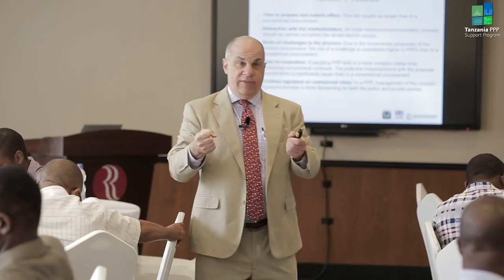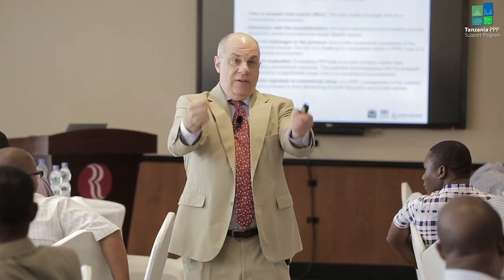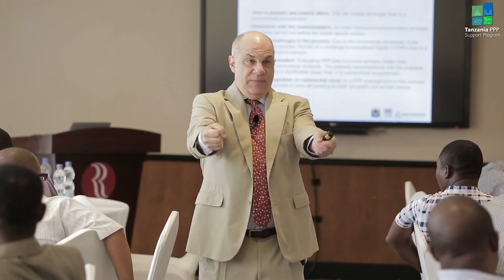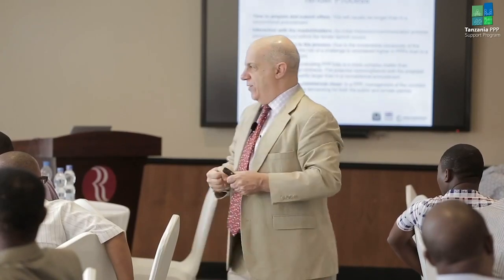The reason being is they still have to borrow the money a lot of times. And the only way they can borrow the money is to have a contract that they can take to the lender, the bank, and say, hey, see, we have our contract. Now, please give us money that you said you would give us.